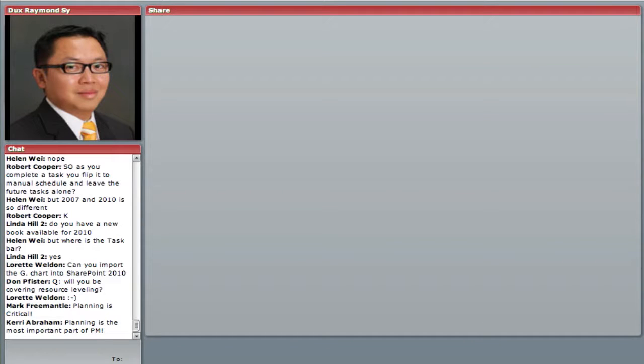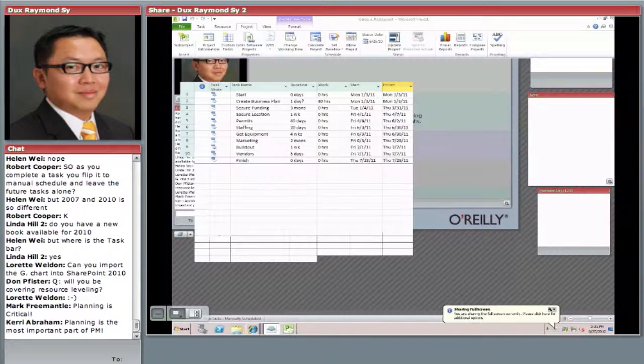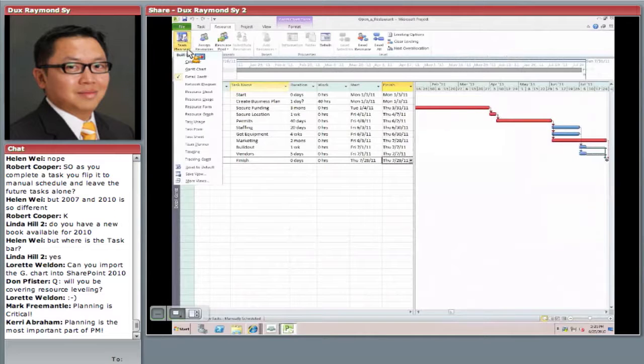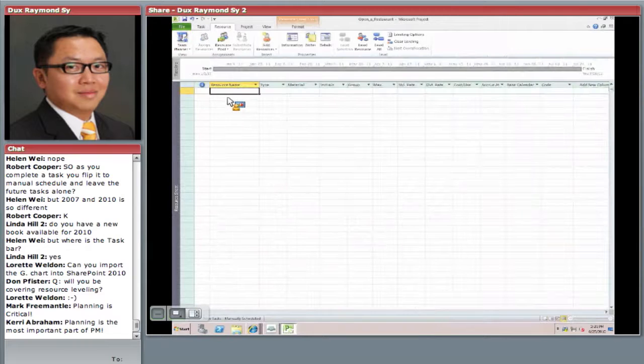Okay. So let me go back to my copy of Microsoft Project, and I'm going to show you the last 3 steps, and then we'll talk about tracking. Okay. So here's where we're at, friends. I've got the links, the dependencies defined, the calendars defined. So let me start working with resources. I'm going to click on the resource tab, click on the view and pick the resource sheet view. Okay. So in the resource sheet view, I'm going to start putting in my resources.